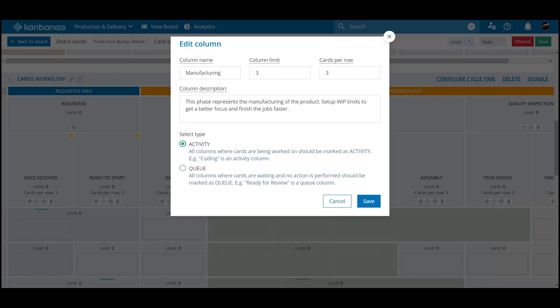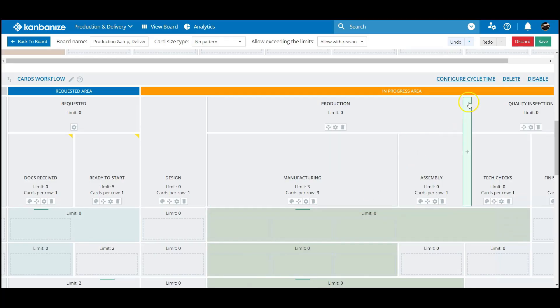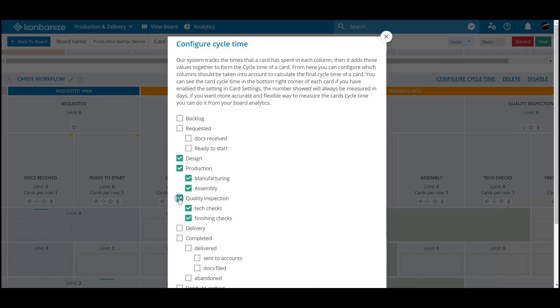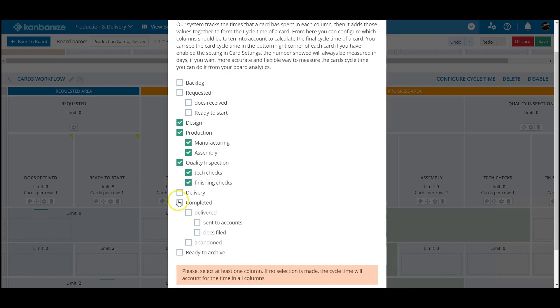On this topic, each workflow gives you the chance to specifically define your cycle time for that board area. Some columns are active and others, regardless of being in the in-progress area, are effectively waiting points, so many managers discount these metrics from their calculations.